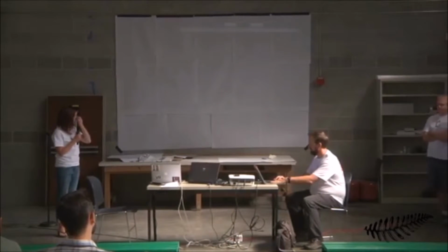So just one comment, which is, basically this has what is known as 4D modeling, fully on the web, without any need of any desktop application. And not only that, you can actually simulate the critical path. And the slider that you see on the top, you can view the look-aheads, so you can play with the range of the data that you have, and you know what activities are happening within that range. And also you can go back and forth in time to view the 4D simulation. So it has 2 functionalities in one viewer, fully on the web.